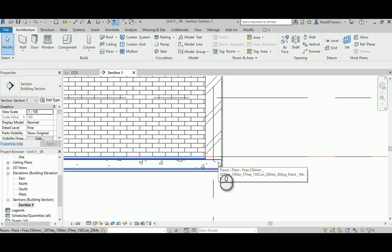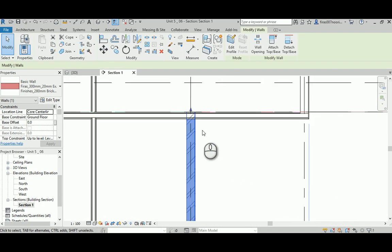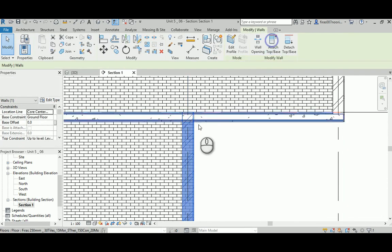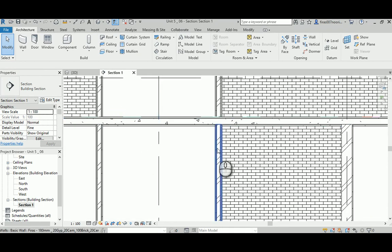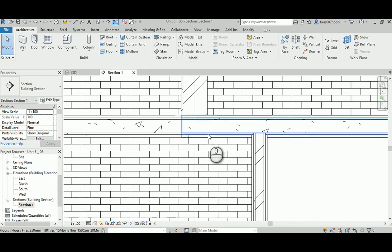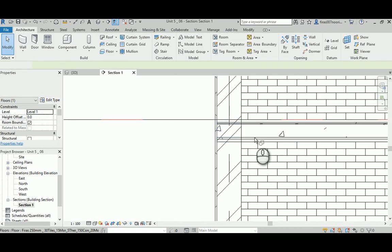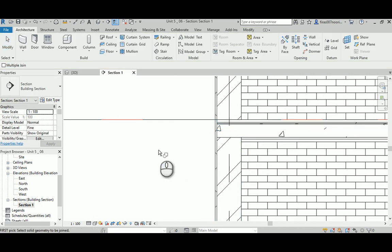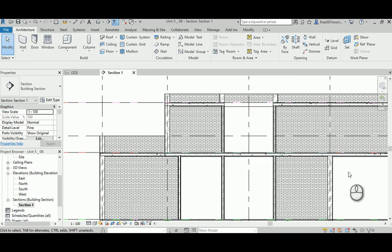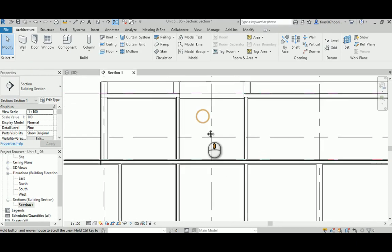Make sure you have the same correct join across all the joint areas. For example, join this wall with the slab. Also, attach this wall to the slab above. This will significantly affect the bill of quantities and the actual material required. Make sure all walls are attached and joined correctly. Using more than one section in different locations will help you get better results.